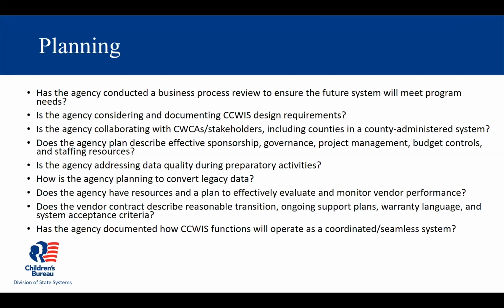And particularly with CWCAs, this is so important because involving CWCAs early on will help you in the planning stage determine the project scope, timeline, and the resources you'll need for the project. For example, how many CWCAs do you have? If you just have a few, it may be a lot simpler than if you're dealing with a whole host of them. Is the plan for all the CWCAs to be using the CCWIS? There you would take a different approach and your schedule would look a lot different than if you are going to go the route of having CWCAs using their own systems, which require the bidirectional data exchange with CCWIS.